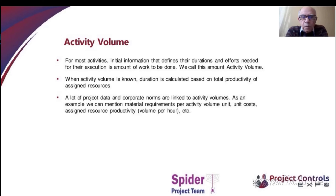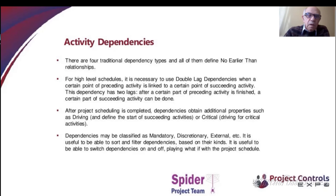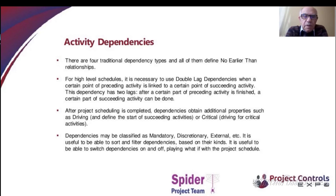A lot of project data and corporate norms are linked with volumes, like material requirements per unit of volume, unit cost, and productivity measured as volume per unit. Spider Project uses activity volumes as initial information and calculates everything else. Of course, there are also activity types that we call duration-based — you can enter duration directly — but for most activities, the initial information is the volume of work to be done.